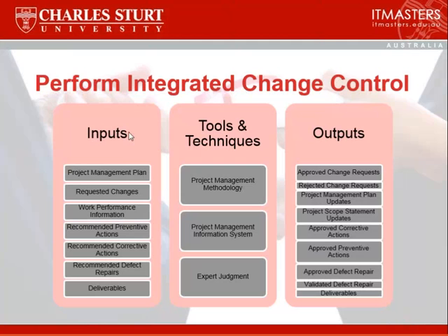Integrated change control, these are all the inputs, the tools and techniques, and the outputs include approved change requests, rejected change requests, updating your project management plan, etc. The project management plan, by the way, is a living document because it should reflect what is the plan at any one moment in time.